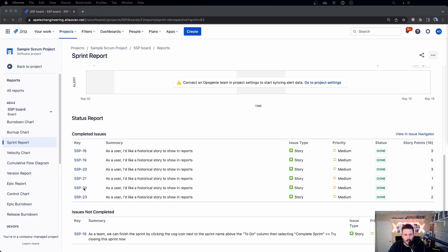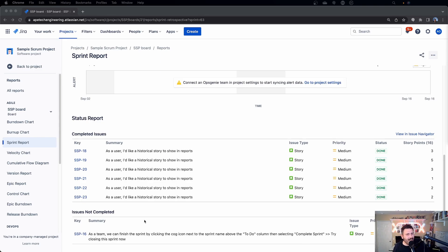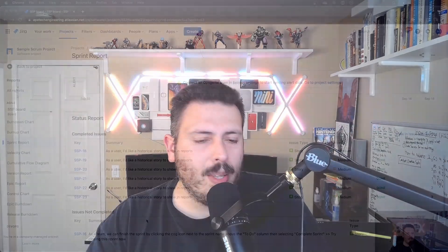What you'll get here is the stories — what type they were, whether stories, bugs, or tasks. You'll get the priority for those items, the status they're in, and the number of story points completed, which is 16. And then below, you'll get the bad news — which is what you obviously didn't finish. Most teams try to shoot for 100% completion, but I've never seen a team hit that. It will tell you what didn't get completed and what's going to roll to the next sprint or get pushed back to the top of the backlog.